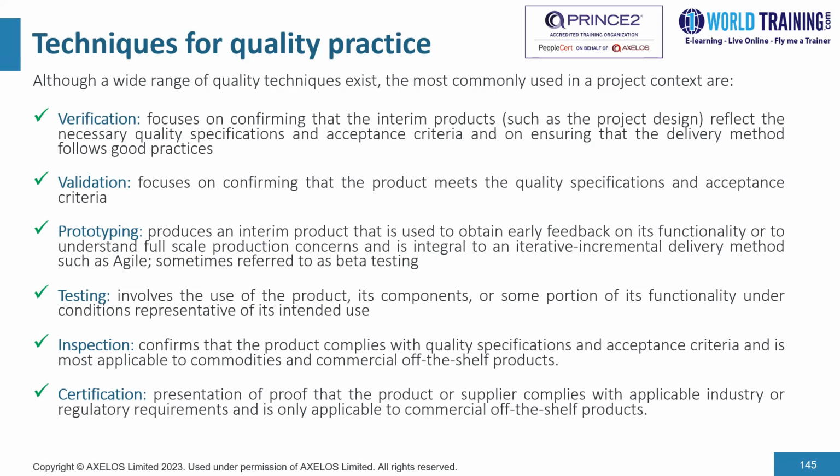Inspection is another technique which confirms that the product complies with quality specifications and acceptance criteria and is most applicable to commodities and commercial off-the-shelf products. And then finally, we have a technique called certification, which presents a proof that the product or the supplier complies with the applicable industry or regulatory requirement and is only applicable to commercial off-the-shelf products.